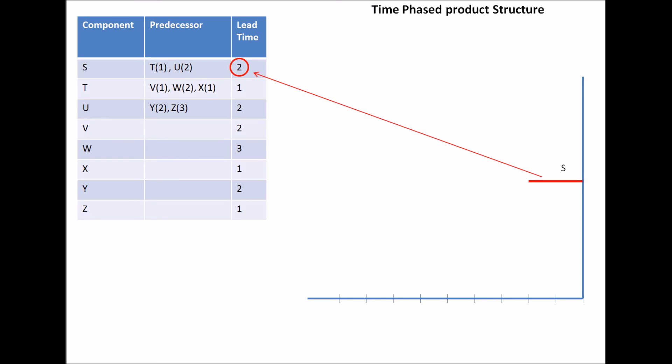And then, since S requires T and U, the chart is going to look something like that. Since U has a lead time of two weeks, and T has a lead time of one week, T is half of the length of U.